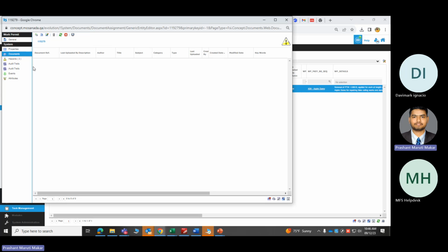You completed the task, okay, now you have to upload the documents in the task, but you uploaded the documents in the quotation by mistake. What happens? That approved quote will be cancelled, and it will go back again to the approval stage. Okay, got it. So also you cannot approve immediately; it will take some time, it will go back again. So always remember, if you miss one of the steps, it will be cancelled. It will not be approved immediately unless you do it step by step.